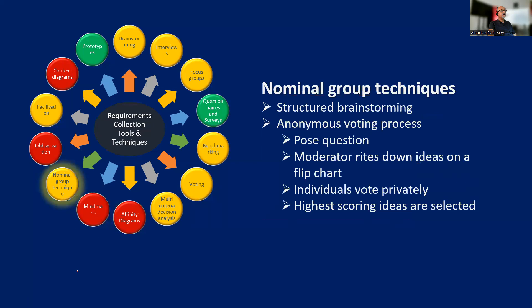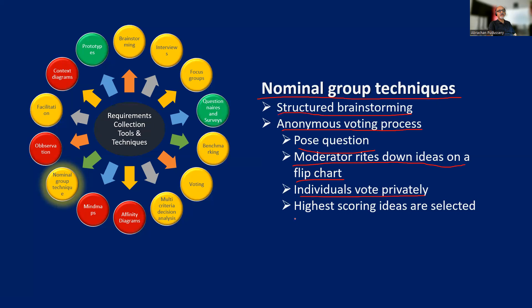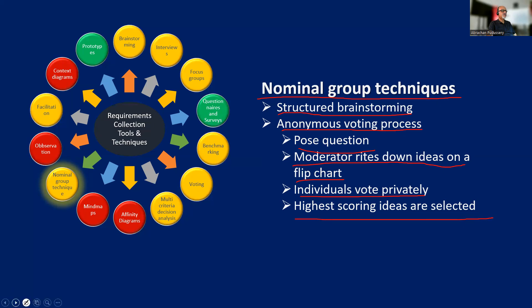Then comes the nominal group techniques. Here we are talking about structured brainstorming with an anonymous voting process. You come out with ideas and the participants vote the ideas so that those ideas which get maximum votes can be given top priority. A moderator writes down ideas on a flip chart. Individuals vote privately and highest scoring ideas are selected. So nominal group techniques can be used to prioritize the output of brainstorming based on voting.